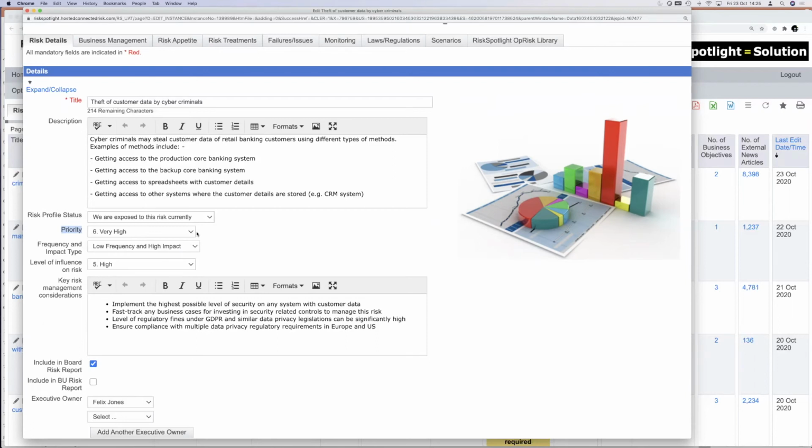You don't have to do it as part of every RCSA, because your inherent risk is not going to change in every RCSA. It's going to remain static unless your business has completely changed from the last assessment. So that's what I would recommend: you can still prioritize your risks by creating a value, and then all those risks with potentially large inherent risk exposure, you just flag them based on these levels here.